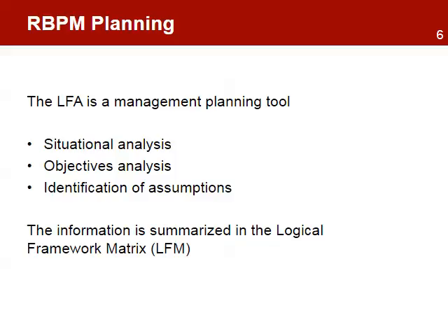The LFA is a management planning tool. It is concerned with the process for situational or problem analysis, the analysis and development of objectives and indicators, and the identification of assumptions. All this information is then summarized in the Logical Framework Matrix, or LFM.